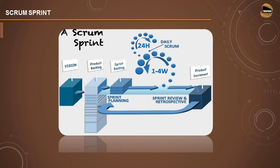The sprint gets started by following generic activities like designing, coding, testing, and reviewing, so that whatever you have done is verified and validated. This cycle continues depending on the sprint duration of two to four weeks. There are also certain ceremonies which happen during or before the sprint begins, which we will be talking about in more detail in upcoming tutorials.